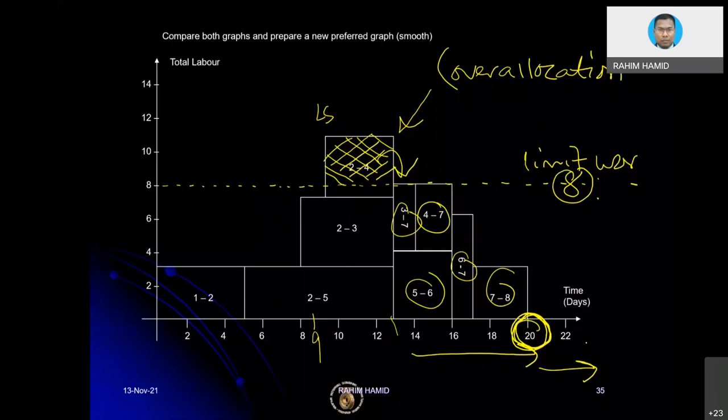That is the scenario of resource leveling, or resource limitation. Whereas in the case of resource smoothing, we do not go beyond the time period that we already set, because we only adjust the activity according to available total float. But in resource leveling, the issue is that because we want to limit the resources,